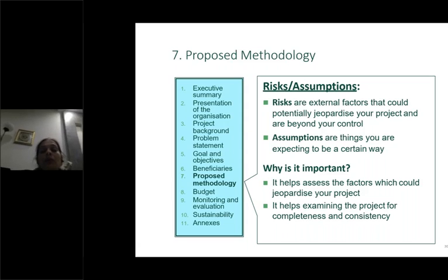That is the biggest risk, because sometimes the money does not come from the funding agency. Nowadays, once you present the project, they ask whether you need 5 equipments. They will say okay, we give you 2, and then they give full funding for those 2. But sometimes I require a major equipment and the funding agency doesn't give it. Although they sanction the project, they do not give me money for that equipment, so my whole project idea is lost. That's the kind of risk involved.